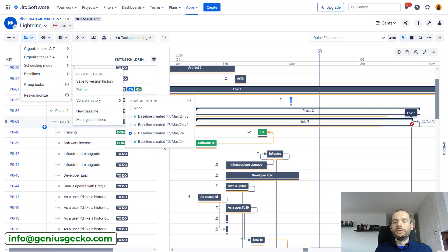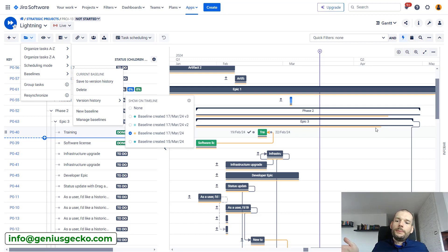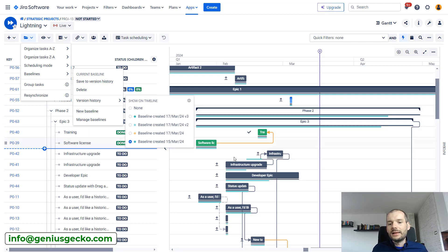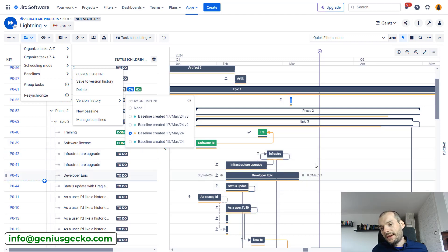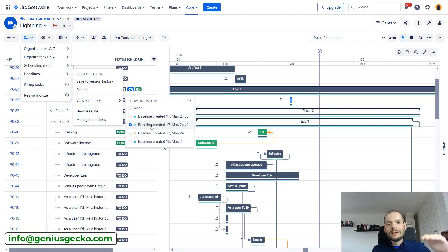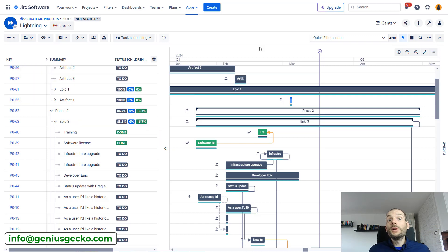Now I can compare my current baseline dates on the issues against a historical baseline from the version history. So I see not only drift compared to the current baseline but also compared to any past baseline I select. For example, my first baseline has certain values, the next one shows some delays, and the current baseline shows even more. I can click through all those baselines and see what changed over time.